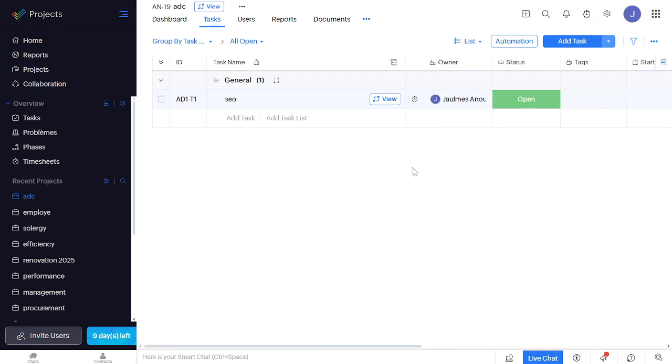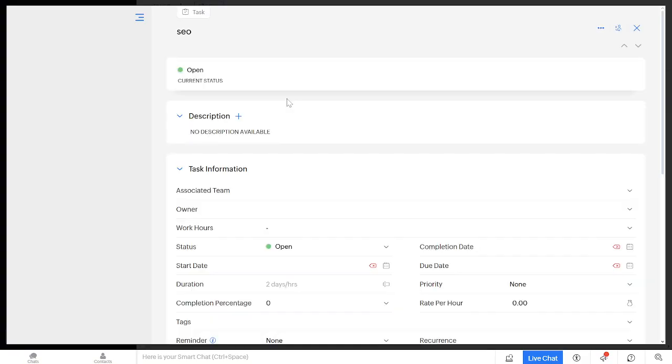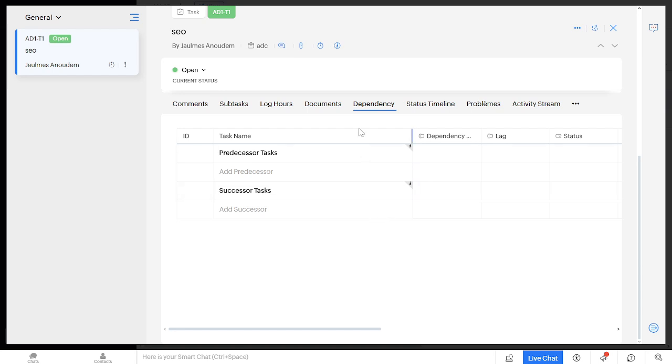Now that we've done that, it's time to sequence your tasks. This is where you need to determine which tasks need to be completed before others can start. This can be done by setting dependencies between tasks. You'll do this by clicking on a task, then on the Dependencies tab, and selecting the necessary task from the drop-down list. This helps us because it enables us to create a logical flow of tasks and prevents any holdups in the project process.